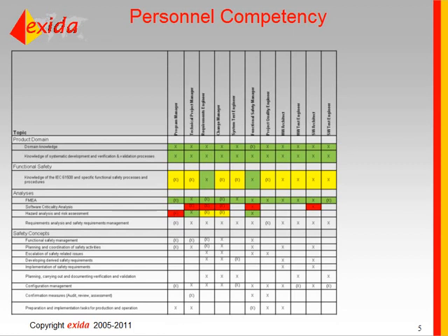And so one way to do that is to create a matrix similar to the one shown here, which essentially shows in the columns the different roles that will be fulfilled on the project. You have somebody who's a requirements engineer who's responsible for creating the requirements, for example, a system test engineer who's going to test the product, a hardware architect, a software architect, software test engineer, etc. So people fill different roles, and based on the role you fill, there'll be different knowledge and skills that you need to have to perform those roles.